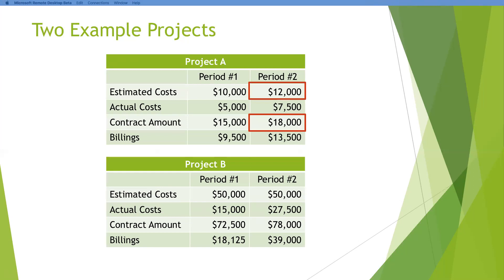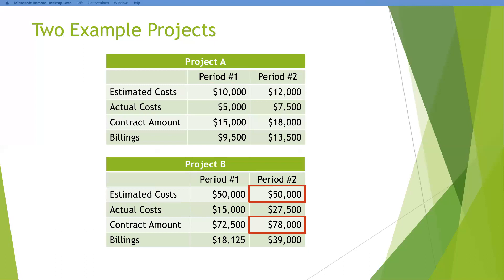One thing I wanted to point out — because we've been talking about how important change orders are — by the time month two rolled around, it looked like this contractor issued a change order, because the contract amount has gone up. And he did his job really well on the estimating side, because his estimated costs have gone up too. His budget has gone up for his costs. On project B, however, the contract has gone up but the estimated costs haven't gone up. So as an advisor, when you get these numbers at the end of the month and you're walking through this with your client, this is where you want to say: I think we've missed something here — we got this change order out to the client but we haven't updated our budget.